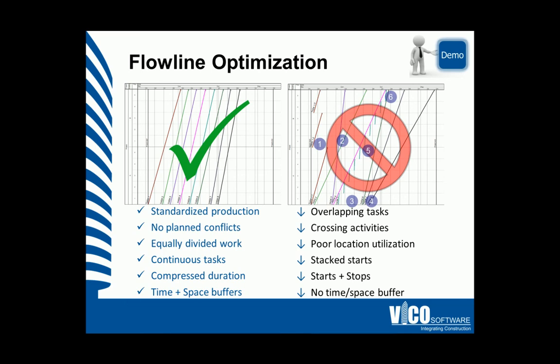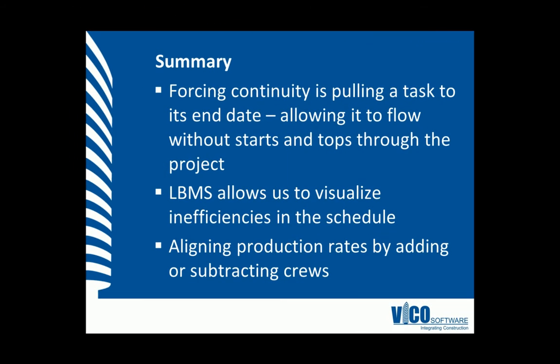We plan for no conflicts or crossing activities. We equally divide the work by location instead of using the locations poorly. We aim for continuous work and not stacked trade. We can compress the duration without introducing the risks of starts and stops. And we can use time and space buffers to mitigate project bottlenecks. This vignette has taught you that forcing continuity is pulling a task to its end date, allowing it to flow without stops and starts through the project. Location-based management systems allow us to visualize inefficiencies in the schedule, and we can use this visualization to align the natural production rates of the tasks by adding or subtracting crews.